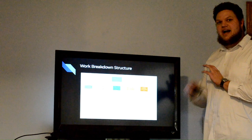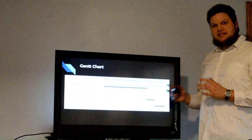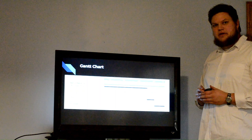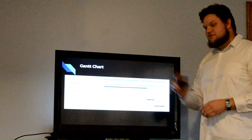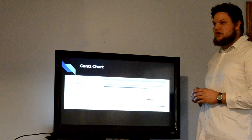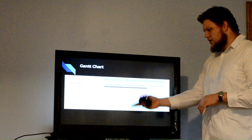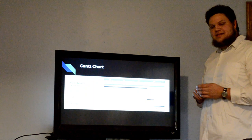Having an inclusive and realistic timeline is equally critical. Beginning with IoT development, getting our data onto a computer so that we can access it and use it in the AR augmentation. After that process has begun, after we have a template for how we're going to do that, we can continue developing that further in tandem with the Vuforia development, which is our AR suite. After our AR suite and our IoT data are developed and synced up together, we'll bring it to the HoloLens, make sure it connects properly. We'll bring the test bench up and make sure that it is seamlessly connected and the data refreshes quickly and remains alive during the experience.